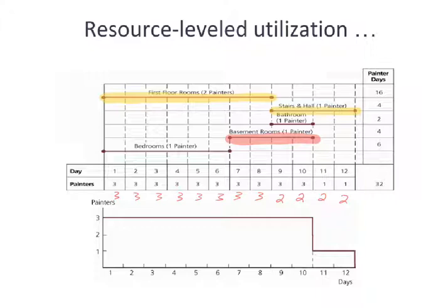So here is our question. Keep in mind that there's multiple choices here. This green solution, the solution right here with the green arrow by it, is if we move this over. If we shift painting of the bathroom over by 2 days. As shown, we have this answer. As shown, we have 3 painters involved dropping to 1 painter. Okay, so this is the current solution. And this is a valid solution, and this is what the textbook shows.